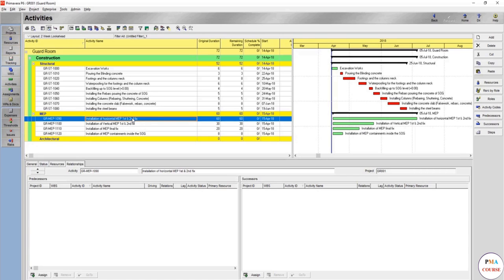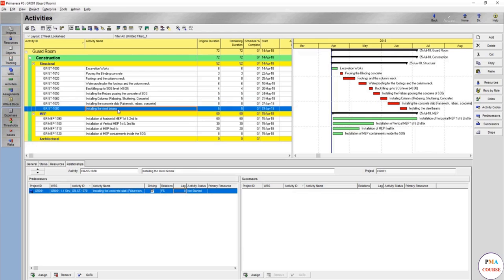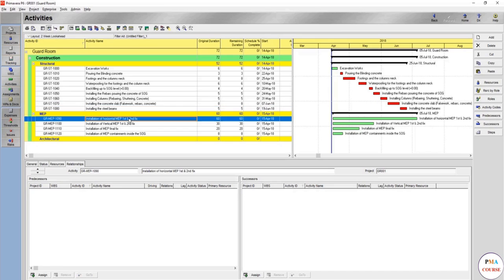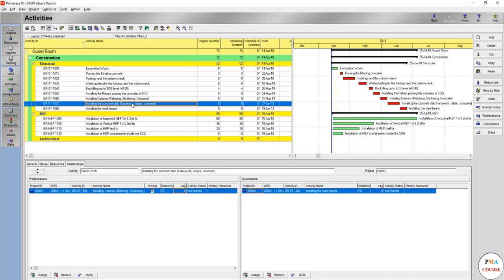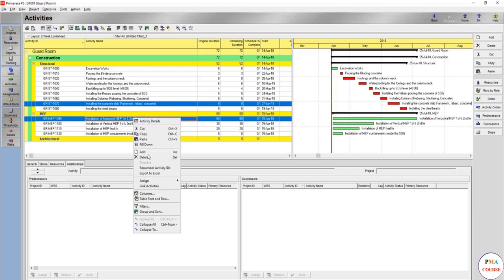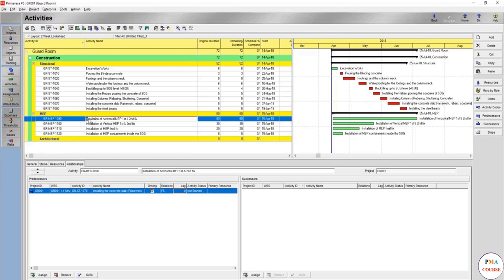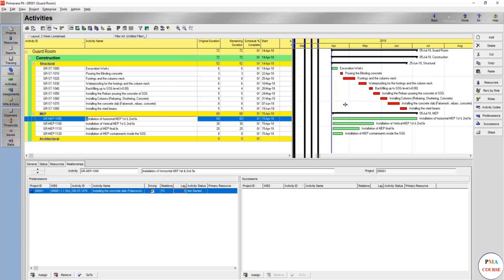First, in order not to forget the relationships as well—now we have made the activities. The MEP first and second fix will be installed after the concrete slab and after the installation of the steel beam in this area. So usually it's after the concrete slab. But remember, if we made this finish to start by linking the activities, remember that this will start directly.